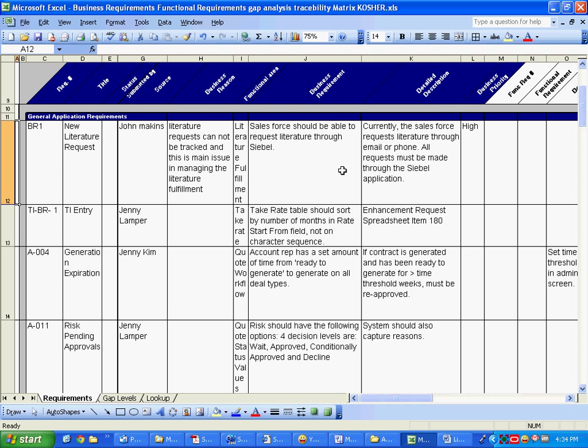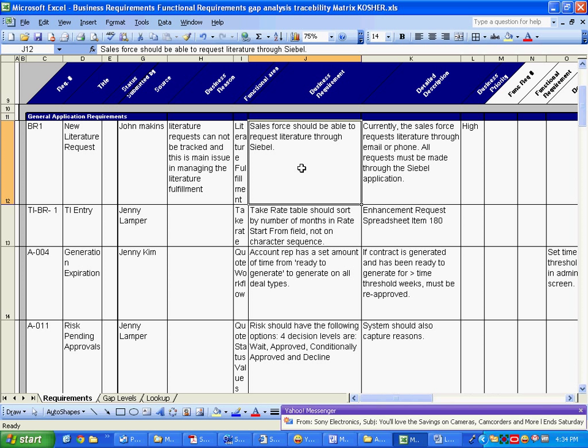I have a basic straw man of how to prepare a gap analysis document. Gap is the English word gap, a difference. It's called gap analysis because this is the gap between vanilla Siebel and the implementation. If it's an enhancement, it's the gap between the existing system and the future system. If it is an upgrade project, you won't typically prepare this, because upgrade projects don't have functionality; it's a technical project. Sometimes they have BS for that, but for a different purpose. Don't worry, if you go to an upgrade project, your life will be very tough.